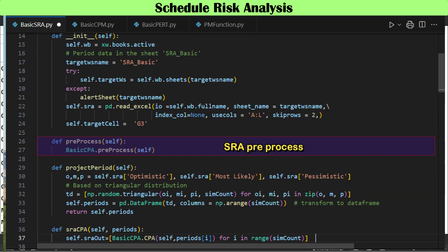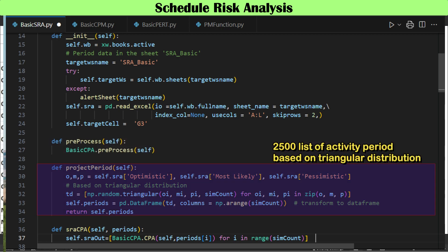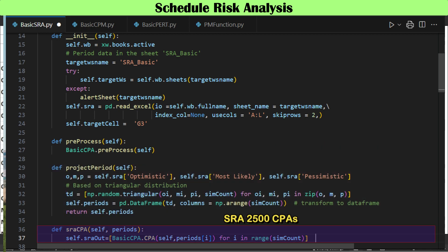The superclass function named preprocess is inherited as-is. A list of randomly selected activity periods is created using the triangular method, generated as many times as the number of simulations in a two-dimensional list, then transformed to a data frame type. Critical path analysis is then performed as many times as the number of simulations — 2,500 times — with different lists of activity periods. At the end of each iteration, the completion dates for the total project are collected and stored, and the program records which activities were on the critical path for that iteration.